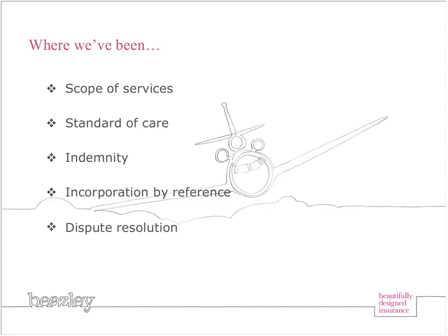Scope of services is an absolute critical component to make sure is sufficiently addressed in your agreement. You want to make sure that your scope is really detailed and defined and consistent with discussions that you've had with the client, and also consistent with any proposal that you've submitted or RFP or RFQ that the client has submitted.